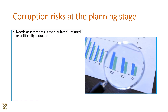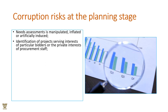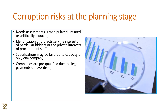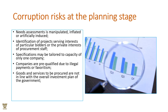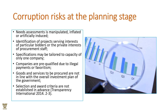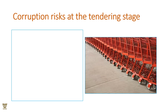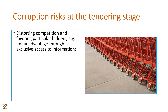Corruption risks at the planning stage include: needs assessment being manipulated, inflated, or artificially induced; identification of projects that serve the interests of particular staff members; specifications tailored to the capacity of one particular company; illegal payments and nepotism; and procurement of services or goods not aligned with sustainable development goals or with the cultural ethos of the country. Being transparent will keep the process clean and clear.